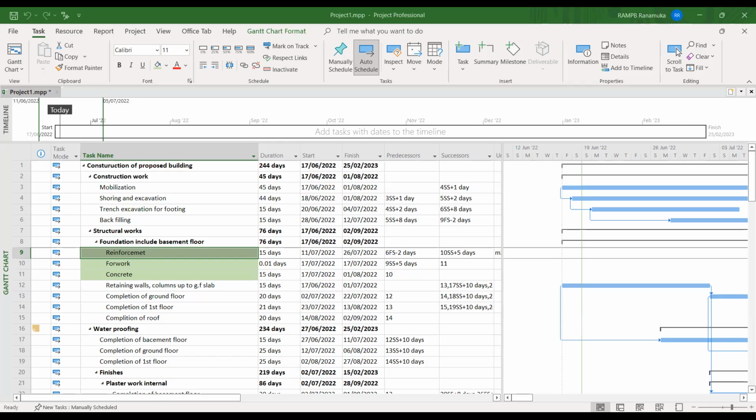if it's not ready mix concrete, I know that I need cement, sand, and metal, and this is only for the concrete works, and also the support of skilled laborers, unskilled laborers, and more than this, there are some other resources also required. We had to find that first based on the BSR or in a manual manner. Always don't use the BSR, because BSR is not for the professionals. You know how to identify the quantities, the material taking off for the items. Without the BSR also you can do it for the concrete.